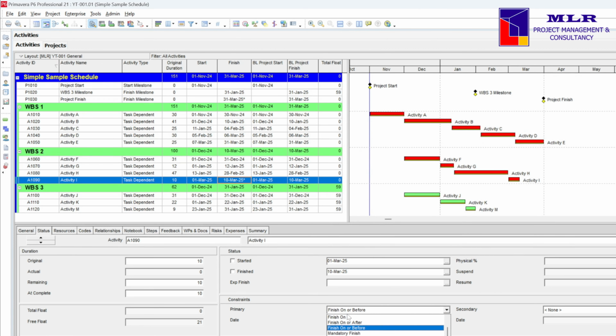However, although it's true that constraints do change the critical activities, that should not completely stop the project from using them. It's really a matter of using them correctly and knowing the limitations that go with them, such as only use the right constraints on milestones that have contractual implications.